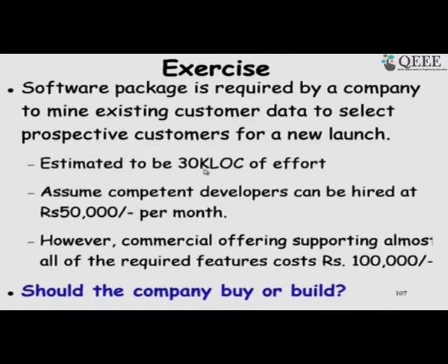And for organic software, if you remember, the expression for effort is given in terms of the size. So, 30 is the kilo lines of code. So, 2.4 into 30 to the power 1.05 roughly works out to be 76 or something. You may try it out on the calculator, or we will use a COCOMO calculator.